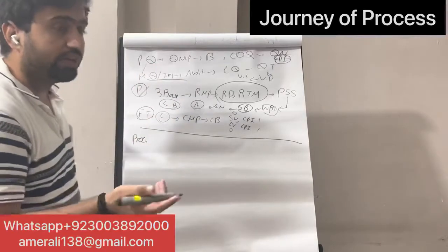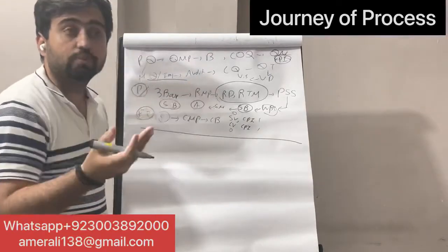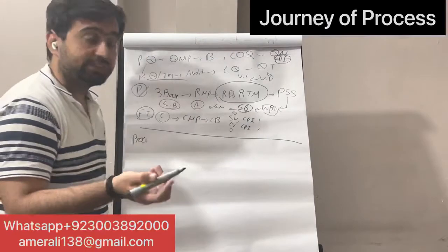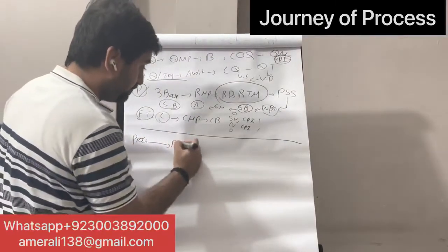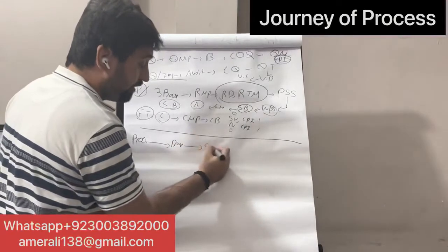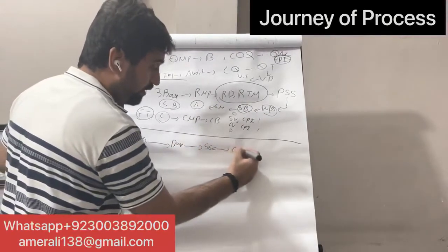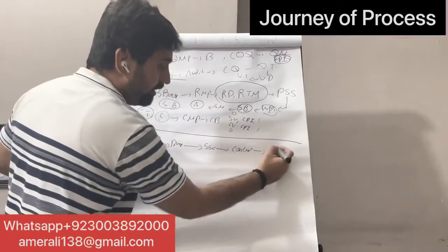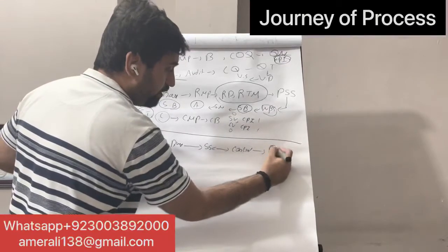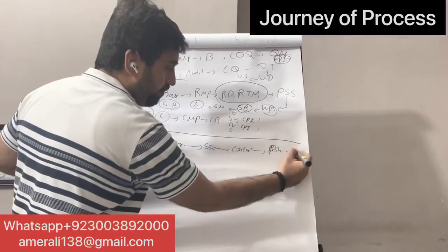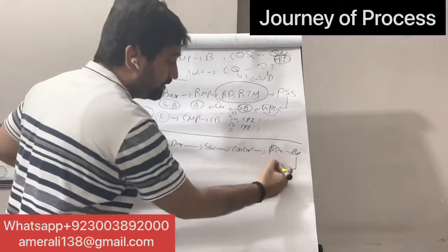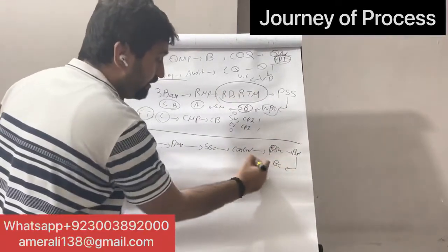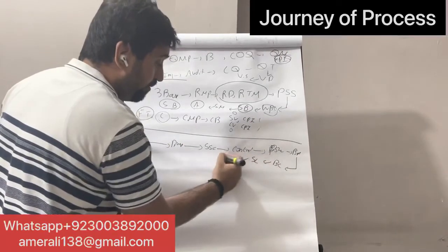To decide your contract, you set the bidding documents through the procurement statement of work. Make or buy, and source selection criteria, then contract. Once that is done, then you make the procurement statement of work and bidding documents. Once the bids come, you have a bidder conference. You shortlist sellers, and you write an agreement with them.